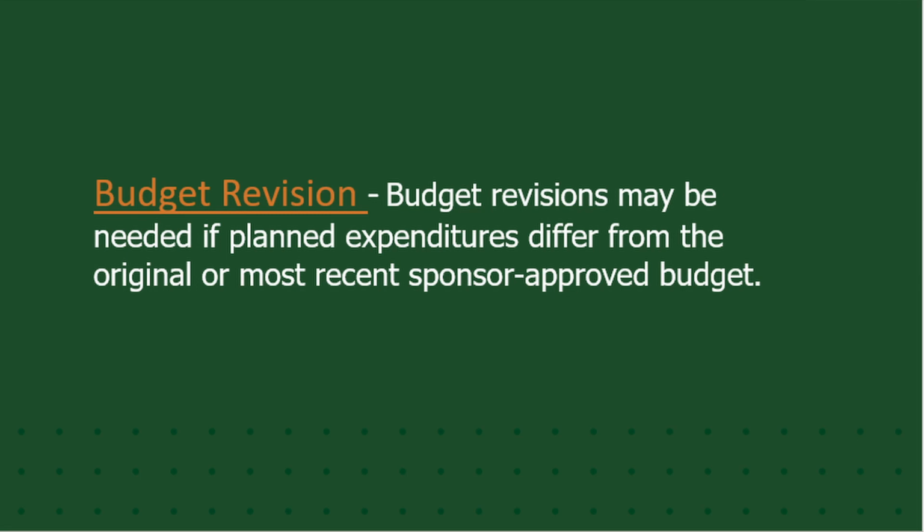So if your cost savings is the type where the work can still be accomplished with the shortened period and you're looking at those cost savings, you want to direct them to a different line item, like, you know, you want to buy a piece of equipment, or utilize some additional equipment use fees or travel or something like that. That might result in a budget revision, because whenever you're moving categorical line items,